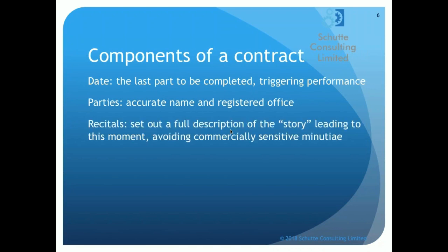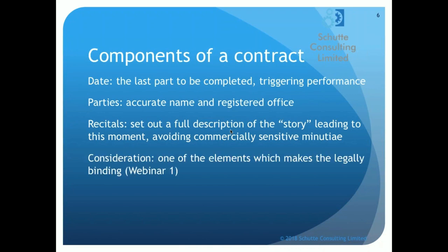Recitals, as I said, they set out a description. So what you need here is a full description of the story, which leads right up to this moment, at the time that the parties are entering into contract. This is why we're doing all of this. Do avoid, however, anything which is commercially sensitive or any details which are not general descriptions of the project. Consideration, as I mentioned, is one of the elements which makes the contract legally binding.